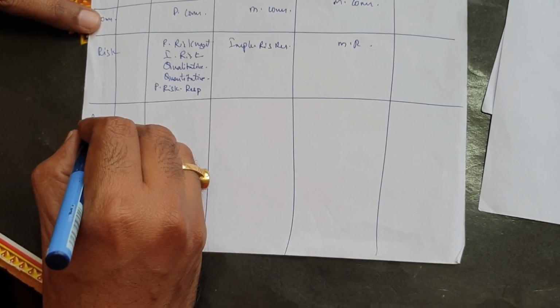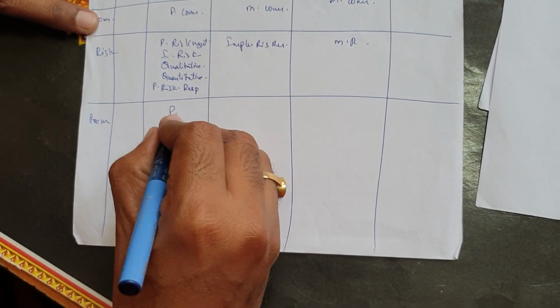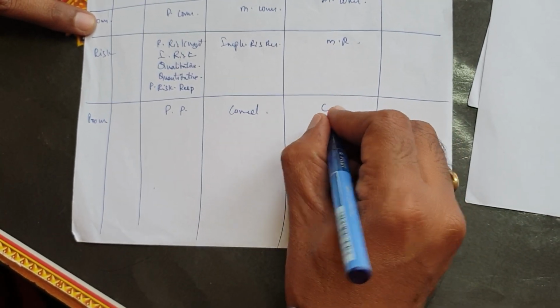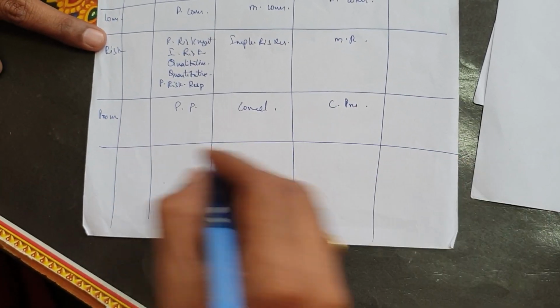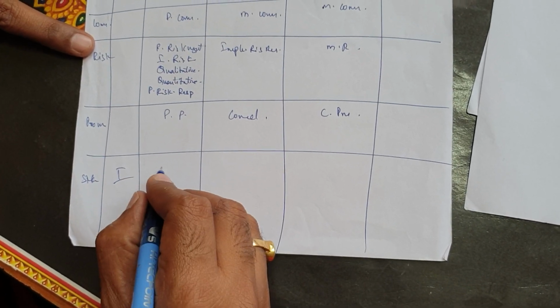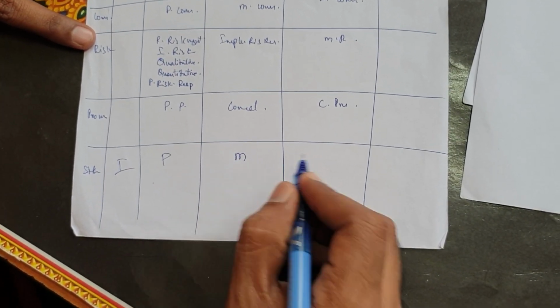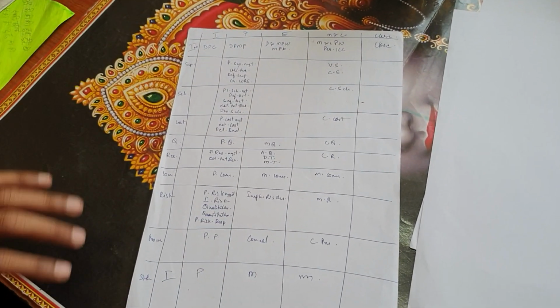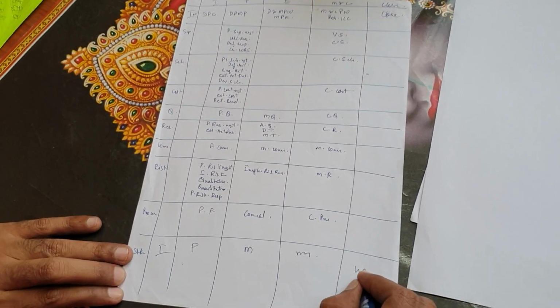Then you move to procurement. In this, you plan procurement, then you conduct, and then you control procurements. Last is stakeholders, in which you identify stakeholders, then plan stakeholder engagement, manage stakeholder engagement, and then monitor stakeholder engagement. So this is the entire process chart showing all the 49 processes.